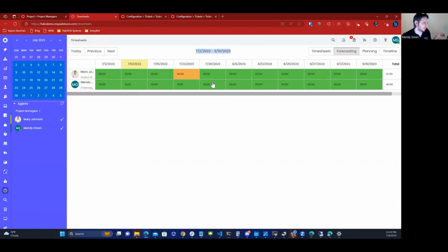So each of these is a week, remember. I have 2 hours slated for Mary on this week of July 9th. I've got 16 hours slated for me. I've got 8 hours the week after that, 10 hours the week after that. Mary has 40 hours. She's booked up. I can't put her on anything else. This is a global view.